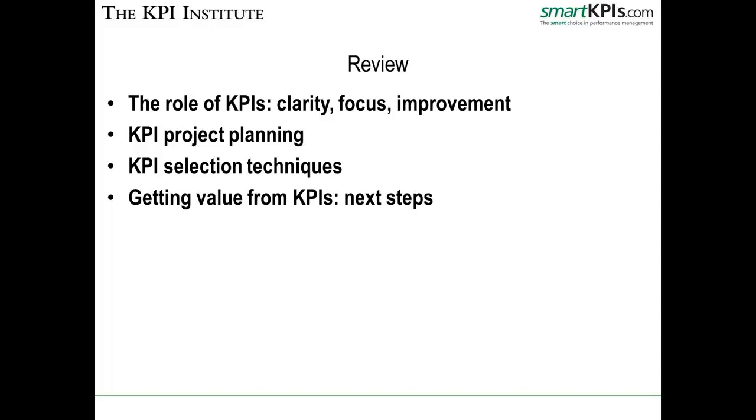from the moment we initiate such a plan until the moment KPIs are reported on for the first time, I'd say it would take at a minimum 2 months, oftentimes even 3.